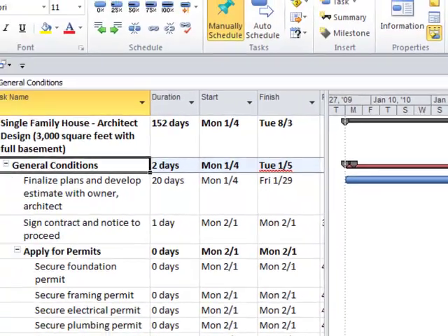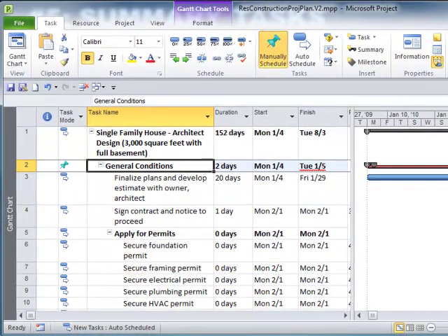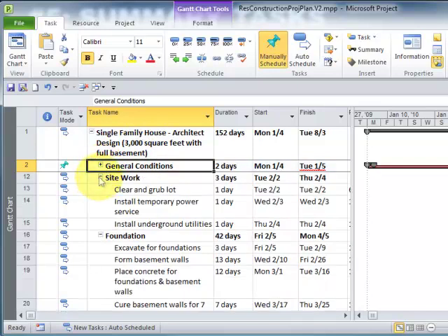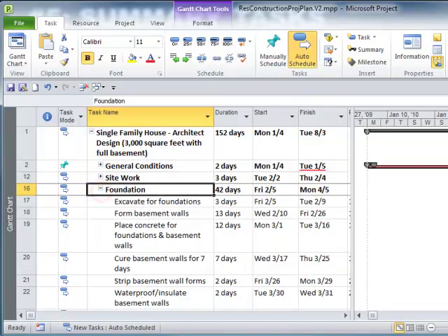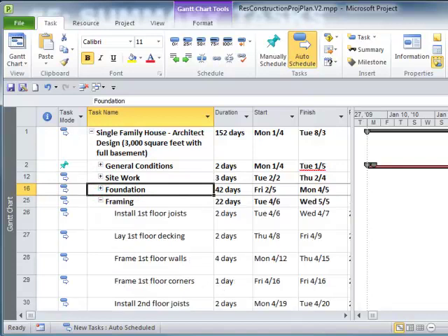Now, you may say, what's the chances of this happening? They're actually pretty good, because in the old versions, again, you can change percent complete, and there you'll go. Your brain will slip a gear, and you'll think, well, of course I can change the start date on a summary task, and you'll do it. And havoc will ensue. You'll have turned your summary task into a manual scheduled task. You won't even know it, and you may generate a report where you've collapsed it down, and it's now not even obvious that you've done this, and you may be telling some individuals that, yeah, I can get that general conditions done in 2 days, when in fact it's going to take you 2 weeks.